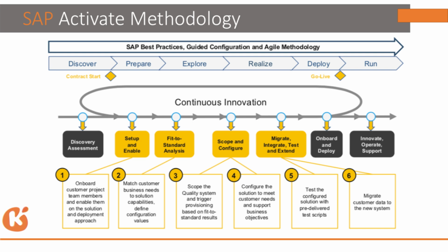And end-to-end testing. In quality itself we need to do end-to-end testing, because before moving to the production system we need to check thoroughly for all scenarios, be it unit testing or integration testing. I cannot say that only configuration needs to be tested, because when it comes to ECP, it is an integrated model. Data comes from EC to ECP, and from ECP it is posted to S4HANA or ECC SAP HR, and cost centers come from S4HANA to ECP.